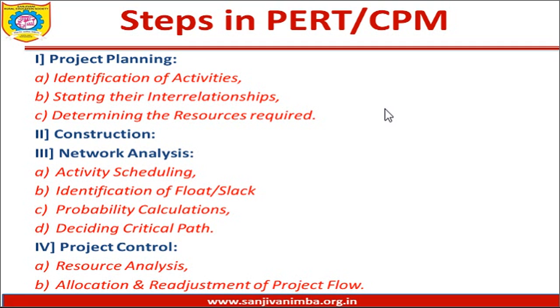So the processes could be, you might have to develop your own business proposal, then you'll have to appoint a merchant banker for your company, then you'll have to apply to SEBI for IPO, then you'll have to comply with various documentation expected by SEBI, then you'll have to comply with various regulatory norms from the government's end. So these are the number of activities that you'll have to run. Then the second thing that happens in project planning is you'll have to identify the interrelationships of various activities.